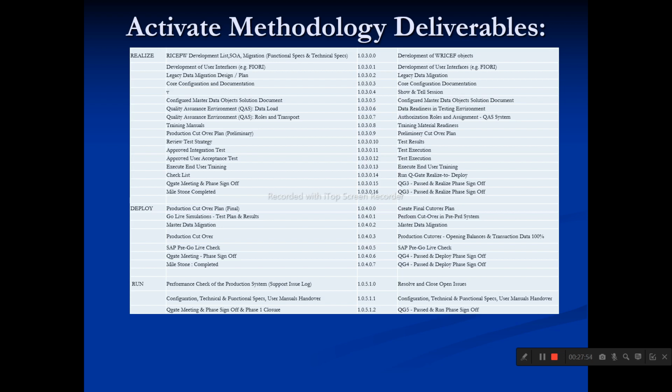As a consultant, what we need to do is create a project and assign the object to that particular project. Then we download the templates and communicate them: what fields are required, what fields are optional, and what fields are not required. This session has to be done between you and the end users, or the super user who provides the master data. Then you can upload this data.